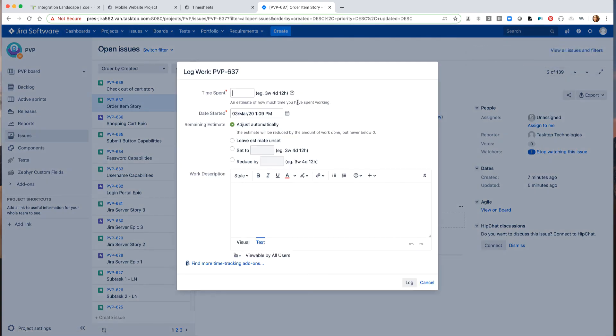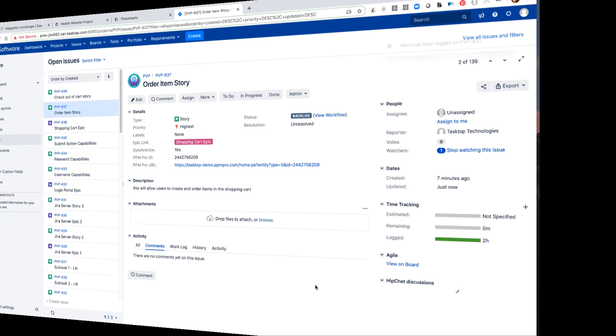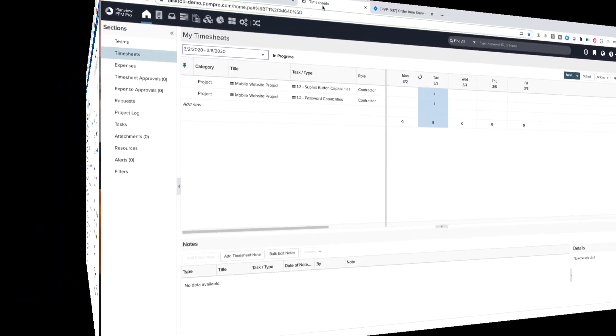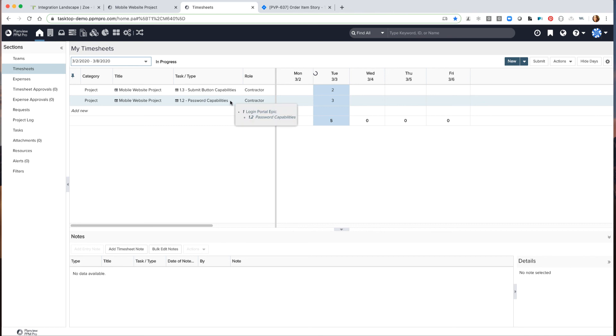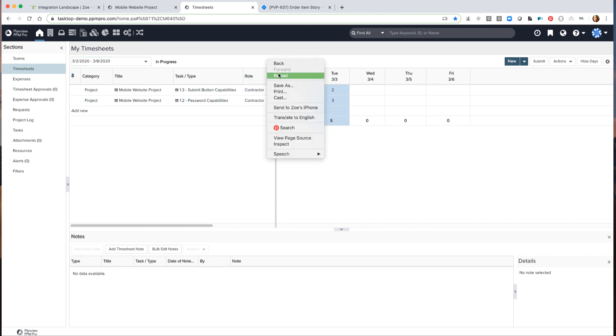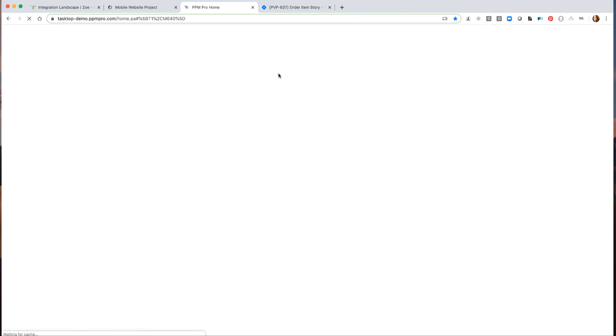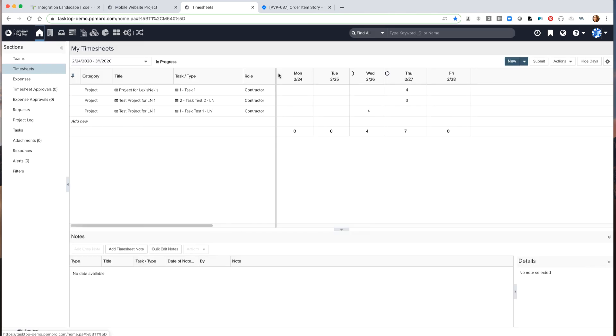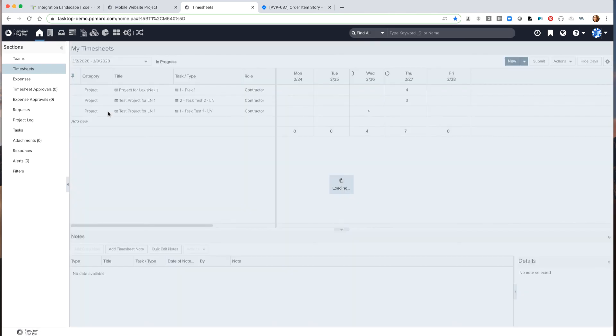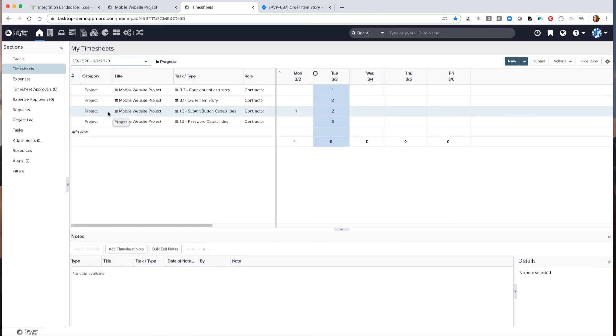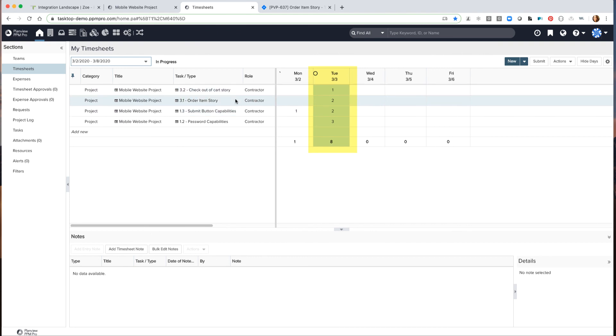Back in PPM Pro, now we can see the project manager's existing timesheets with previous stories and tasks filled out. However, a quick refresh reveals that the project manager's timesheet has been automatically populated with the cumulative work logs added by the developer. We can see that the epic section, as of Tuesday, March 3rd, has a total of eight hours spent on it.